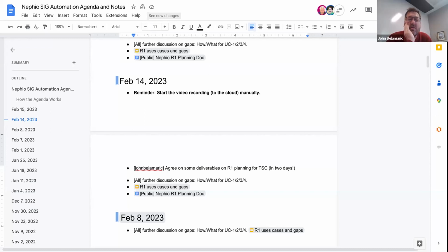I guess that should probably be a line item. This is a good point. Maybe we just need to at least deliver a plan for the design deliverables that we need for R1, even if we can't deliver a broader plan. And then with the volunteers and names, once we have the components and their responsibility, their interactions, people can feel more comfortable signing up. Plus, it helps us scope how much work is there per component.